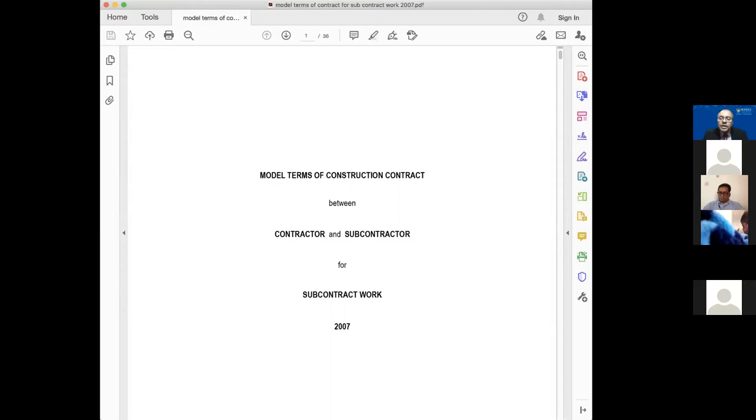So that's one type of subcontractors, nominated subcontractors. Now, the other type, generally around the world, are called domestic subcontractors. Who are domestic subcontractors? Domestic subcontractors are contractors who the main contractor themselves select. So if a main contractor, the head contractor themselves, select a particular subcontractor, that is generally referred to as a